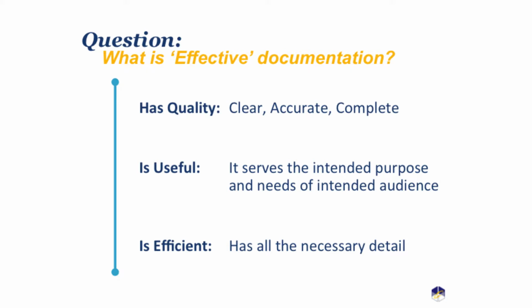Actually, it may be worse than nothing. It might be misleading, ambiguous, etc. And it may lead to decisions being made about architecture and functionality that turn out to be way off base and result in major scrapping of work and huge amounts of rework. So if they're not clear, you've got a really huge potential problem.